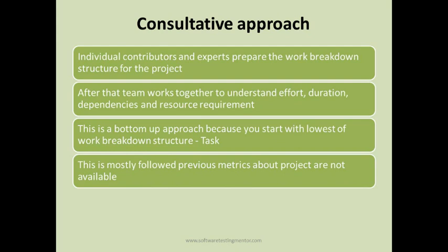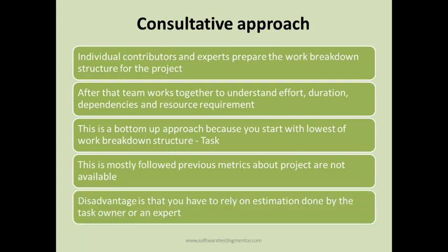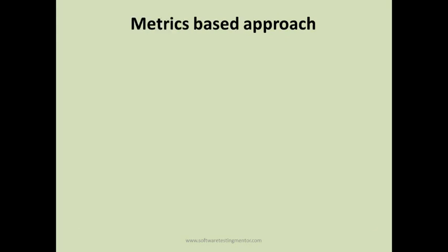If the previous metrics about the project are not available, then you follow the consultative approach. The disadvantage of this approach is that you have to rely on the estimation done by the task owner or the technology expert or business expert. You have to rely on whatever they say, that this task will take this much amount of time. That's the disadvantage of the consultative approach.